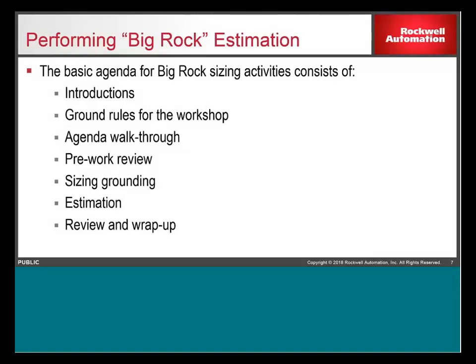So for actually performing the Big Rock estimation, I think I'm probably going a little bit too fast here, but the basic agenda consists of going through and doing the introductions of the stakeholders, discussing the ground rules for the workshop. You're going to have the key team members that are responsible for owning the actual estimates. You're going to have some domain experts that are not necessarily part of that product team, but can help provide insights and guidance as you go through some of the different rocks that are part of